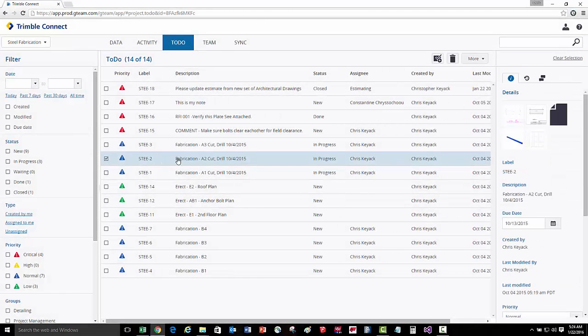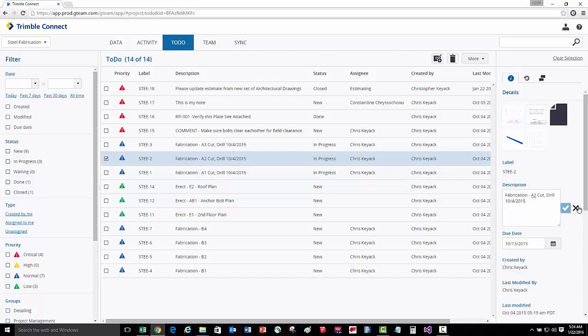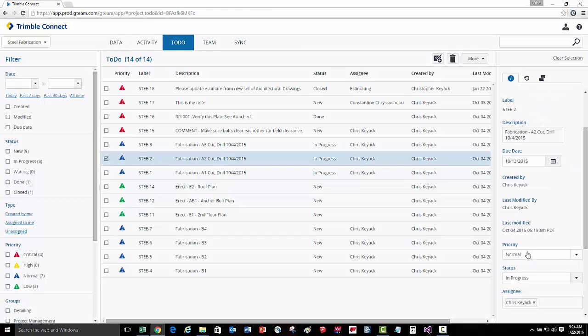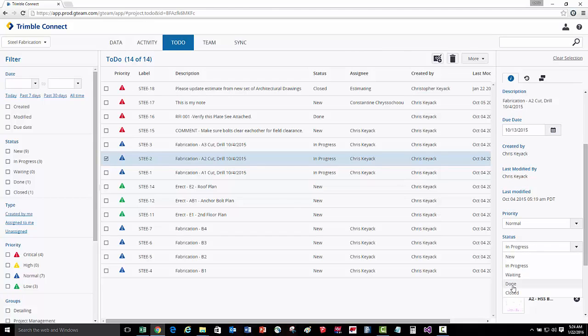In another example, we can track the fabrication status of this part. Here we can see that there's a 3D model, 2D shop drawings, as well as CNC information for the machines on the shop floor, all attached to this particular part. We can then see the different processes or operations that have been complete on this part and on what date. We can then end by setting the status and showing when this is complete.